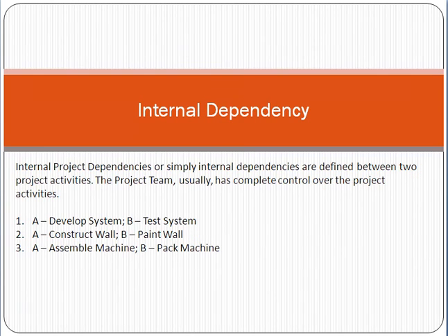Now in the last, the internal dependency. Internal dependency means that you have a dependency on some stakeholder which is a part of the team. For example, develop system, test system. This is an internal dependency. Like once you complete the development, only then the system testing will start. We have another example, construct the wall